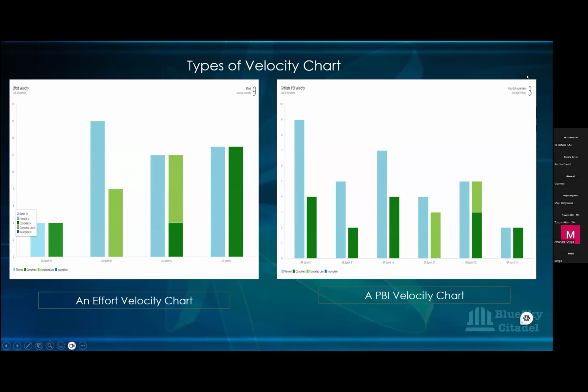So let's use the example of this team now. It's not as if they're not completing work. It's just that why he's giving them a low number here, because you will look at it and say, oh, but they completed on time, they completed on time. What he's telling them is you're overreaching. You're planning more than you can complete. So you're overcommitting to work. That's why he's bringing it down for them. So say normally your average velocity should be 3, not the 9 or 7 or thereabouts that you're putting there.